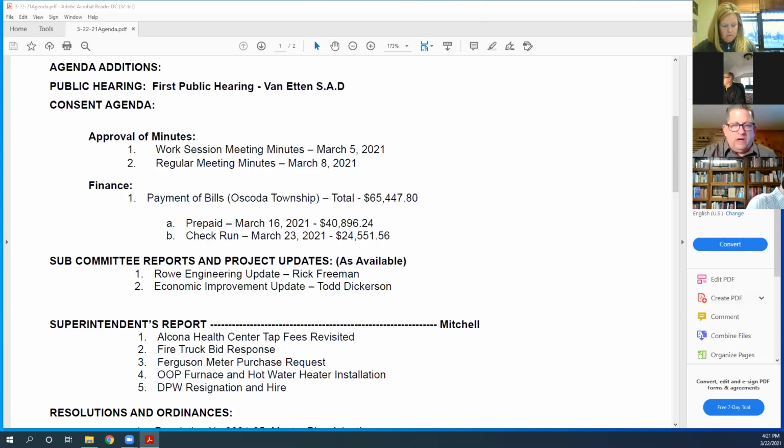The Trail 3 or Phase 3 trail project, again, that one is moving along. That one we will have to start ratcheting up a little bit shortly, probably early April, to get that project ready for MDOT's review in June, so that that project can be obligated and a construction schedule set for fiscal year 2022 and fiscal year 2023.